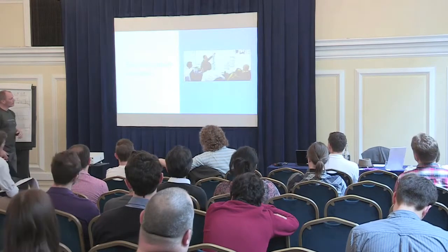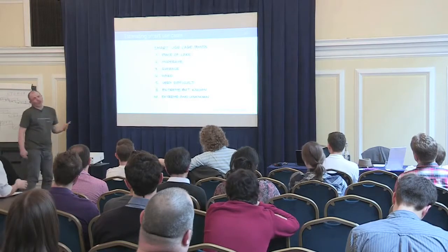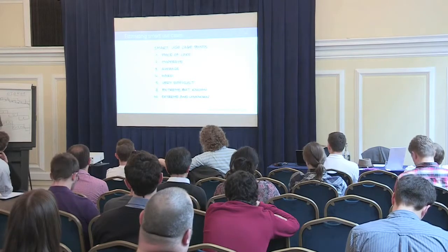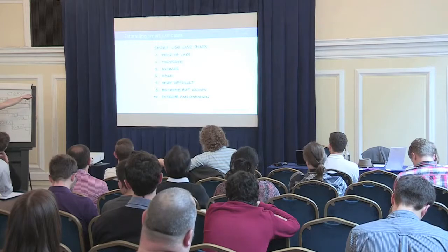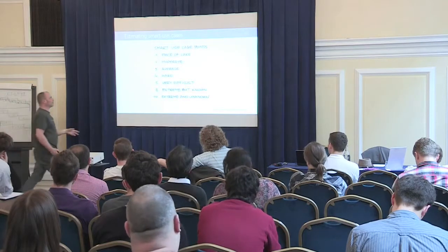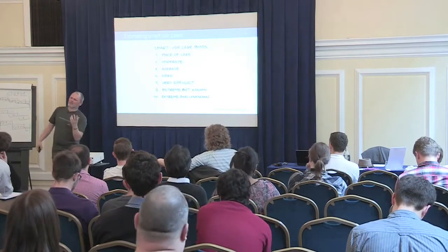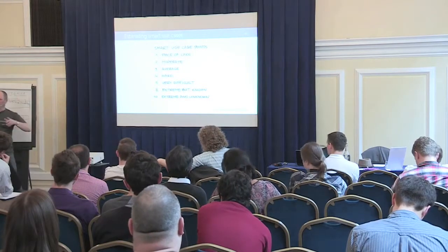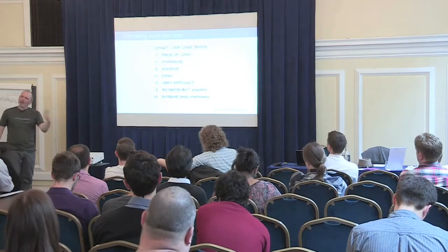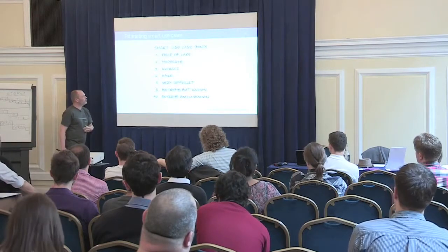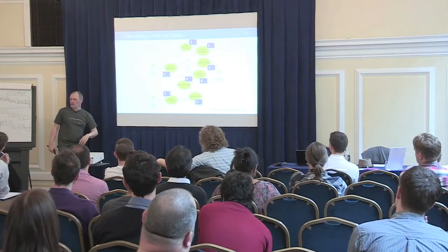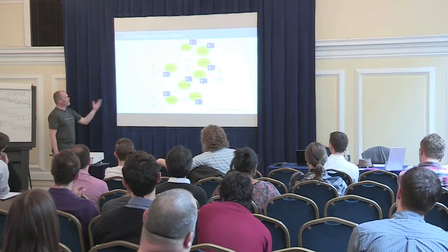So getting to these estimates, we've put up a very simple scale, which is a different scale than if you do user story points, etc. So this is the scale we started using like 10, 12 years ago. Basically ranging from very easy stuff to the difficult stuff. And we added these two slightly later to allow us to say, okay, this is stuff that we cannot grasp yet. We'll find it out later on in the project, but for now we just name it a 10, knowingly that we have to figure this out later on in the project, right? So that allows us to give a very, very easy estimate on doing this stuff. So you put a number on each one of these little ovals, like this. This is the easy thing to do if you do PowerPoint, right? Or you do it while modeling, for instance.